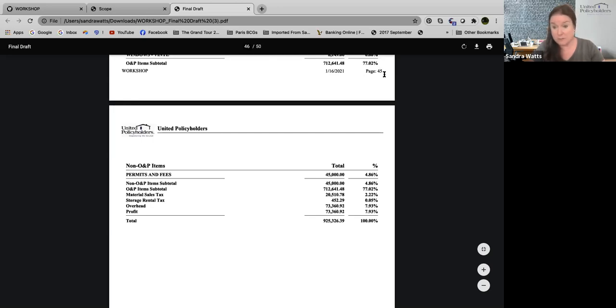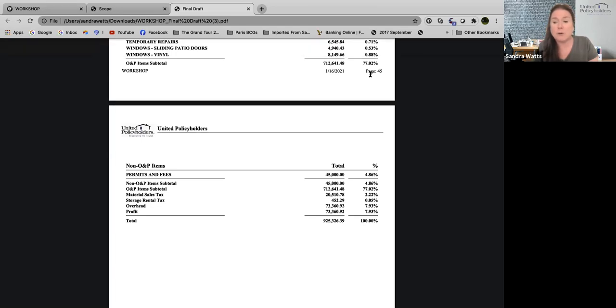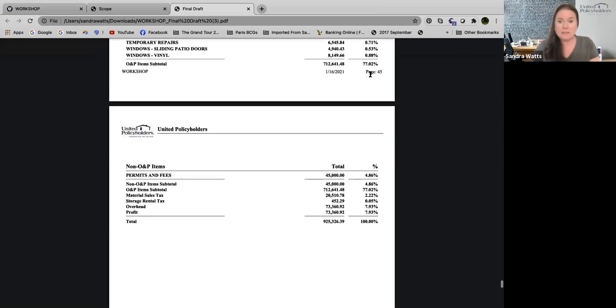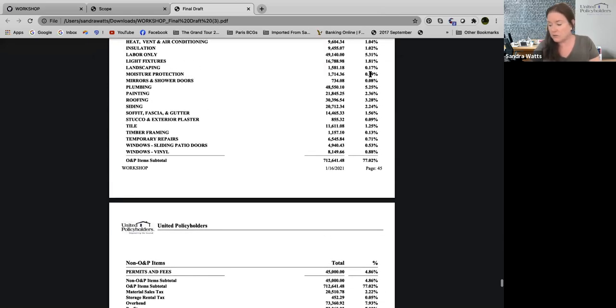This is a 45-page estimate. They need to do every line. And provide the policyholder with a copy of that adjusted estimate. So basically there's nothing that says they can make your contractor submit it in any specific form. It just has to be something that they can see the prices for each thing. They can't do, you know, and when I was an adjuster, we used to have a joke and it was like remove and replace one house, $500,000. It can't be like that.